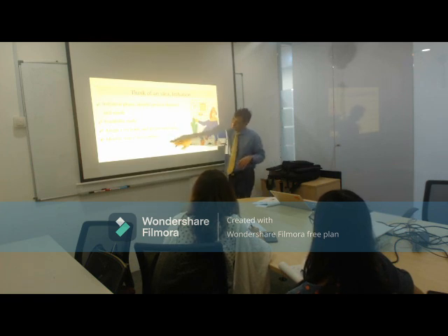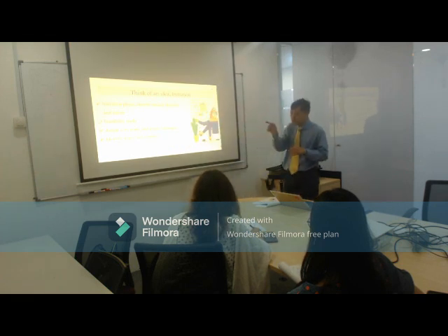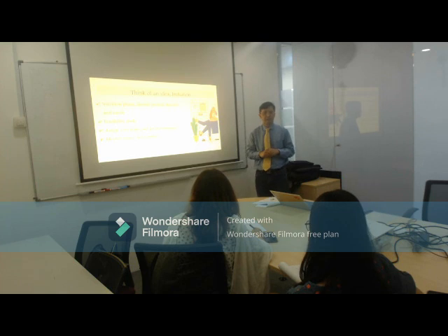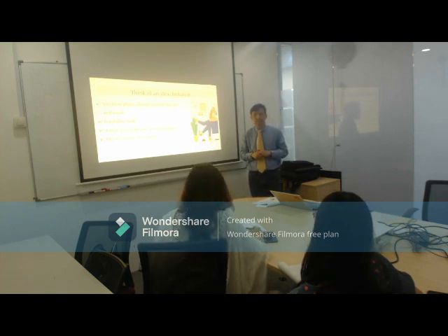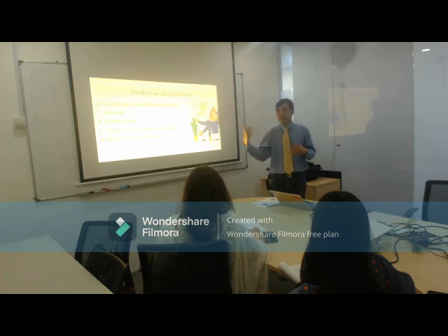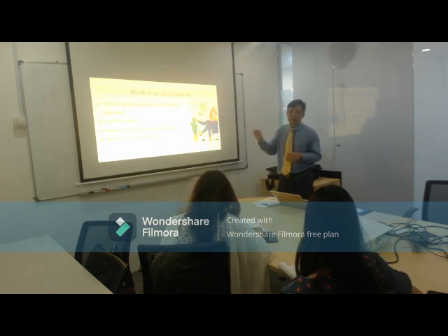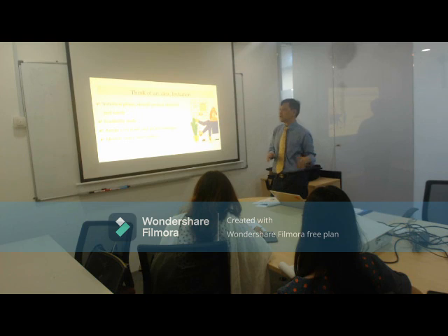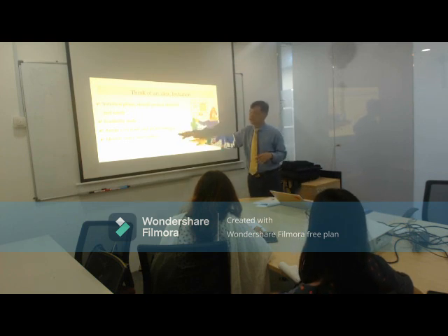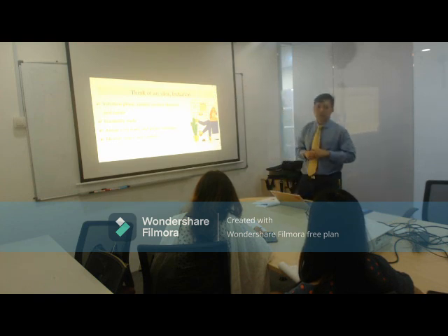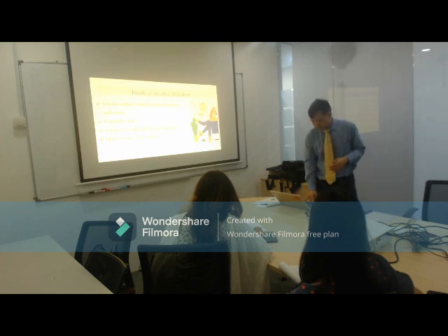The reason why you see the word major deliverables is that in between I may have a small set of deliverables. For example, I may have to work with them to tell them, hey, I want a feature wall. Everybody looks at me and says, feature wall, what's that? So I have to explain to them the idea of a feature wall, where it is, how it is going to look and all that. So that might be a minor deliverable in between the two. Another deliverable is maybe they have to paste all the stickers everywhere so that all my glass pieces will not get painted on. So that's one of the areas there.